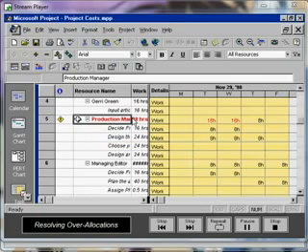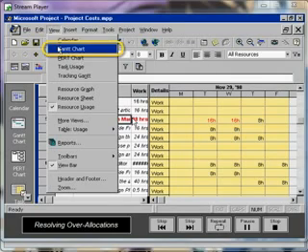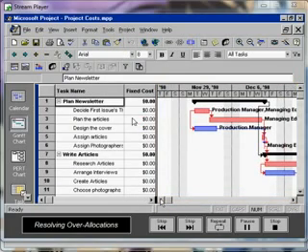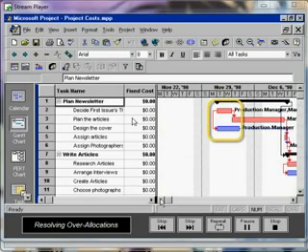We realize we can't work on other project tasks until we decide on a theme, but we can wait to design the cover. So we decide that Design the cover is a non-critical task. Project 98 cannot make this type of judgment call. Now let's return to the Gantt chart to ascertain that Design the cover is non-critical. If we look at the week of November 29, we see that Decide First Issue's theme and Design the cover begin the same day. If we delay Design the cover 2 days, we can resolve the over-allocation.